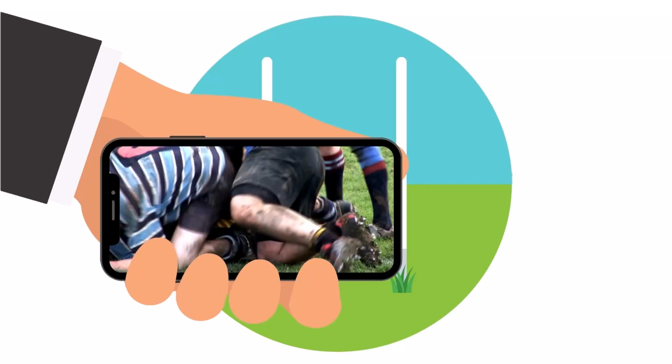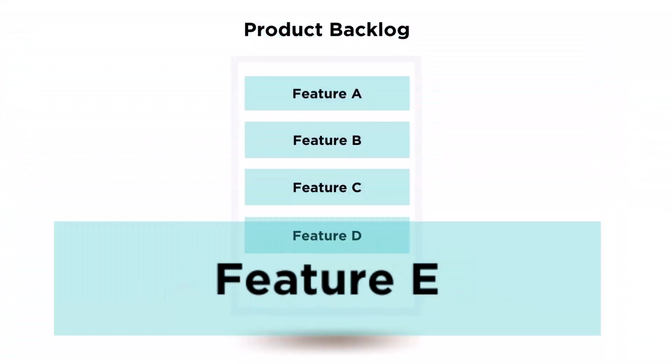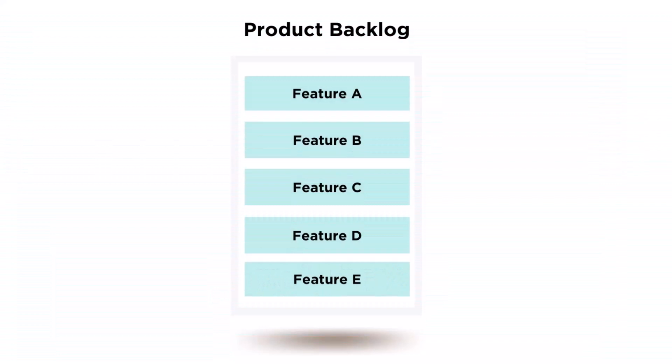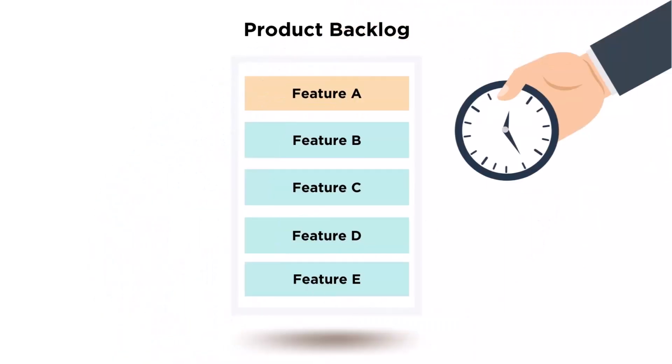With an agile approach, you begin by creating a product backlog, a prioritized list of the features and other capabilities needed to develop a successful product. Guided by the product backlog, you always work on the most important or highest priority items first. When you run out of resources, such as time, any work that didn't get completed will be of lower priority than the completed work.